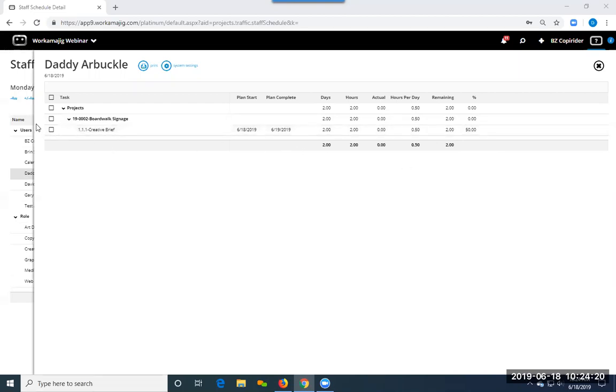In reality, on this screen, it will recalculate these hours to let you know the hours per day. If I was originally allocated 10 hours over 5 days, I would see 2 hours in each day for that assignment. But if I said I was halfway done, it would say, since you're halfway done, you don't need the 10 hours, you only need 5. It will split those 5 hours across probably the 4 remaining days. Does that make sense? So the workload per day would be reduced.